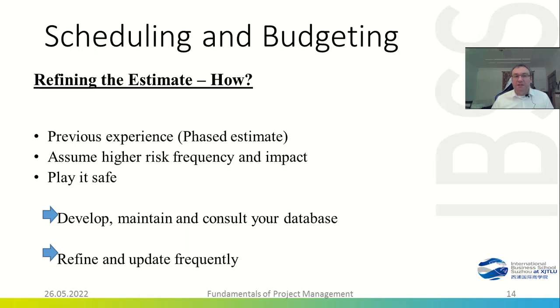In phased estimates, we have the previous experience. What we can also do is assume higher risk frequencies and impact. So we assume that bad things happen more often and are more impactful in terms of time and budget. We can also play it safe and increase the margin in the budget and the timeline.